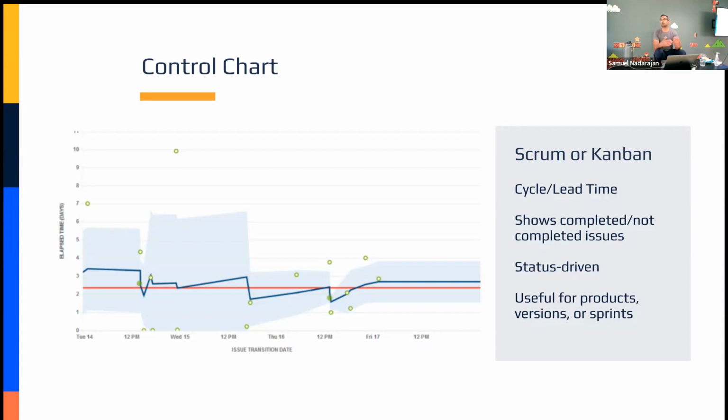And then that way, when you're having your prioritization sessions or planning sessions, if you're doing forecasting and estimating, if you know what the cycle time on average is for your issues, you could say, well, I've got these 5 tickets I need to get done for this release within the next month. If the cycle time for each issue is about 5 or so days, then we're talking about 25 working days to get this done, spread out across team members. So that's really the value of knowing that metric, and how it's going to help you.